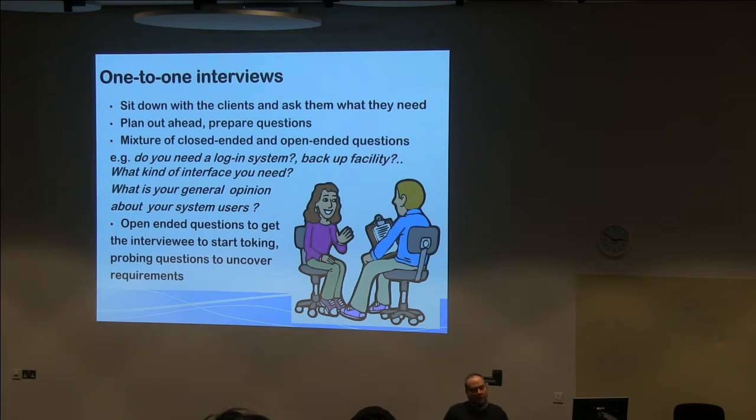So many projects, I'll get them, and I'll get a page that says, here are the requirements. And this one is must have, and this one is should have, and this one is could have, and this one is won't have. Why? Where did they come from? Again, did they just come out of your bottom? So, there needs to be a trail for your requirements. Okay?